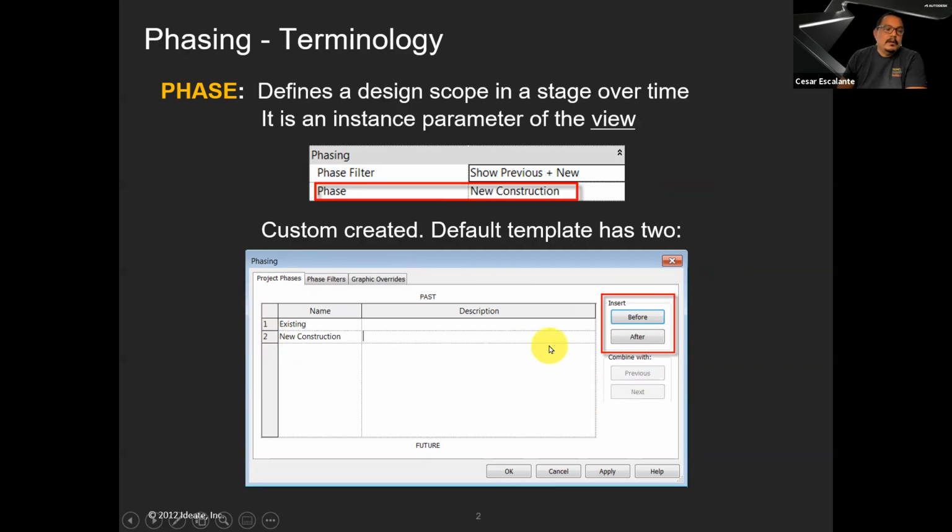In particular, when we are providing a final as-built model to the contractor or the owner, it's usually a good idea to merge the phasing so that, on the operation side and facility management, it reflects the current conditions. Obviously, you will have to make copies or keep copies of the documentation file. All right, clear about what a phase is?